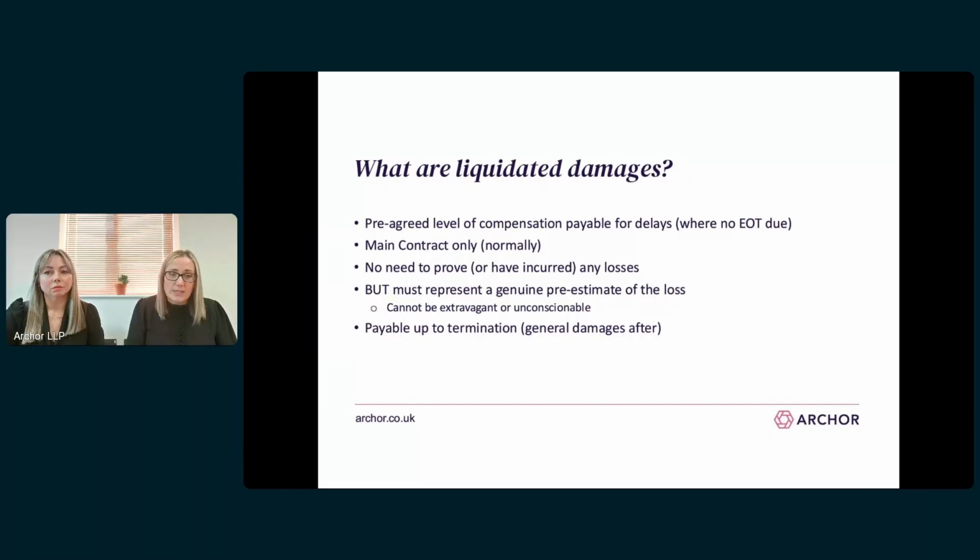It's also worth noting, just as a last point on this initial slide, that liquidated damages are only recoverable up to the point of completion or termination if a contractor's employment is terminated before the works are completed. So if a contractor is in delay and the employer terminates the contractor's employment, the right to claim LD stops at that point of termination, but the employer can still claim general damages relating to any ongoing delay after that termination.